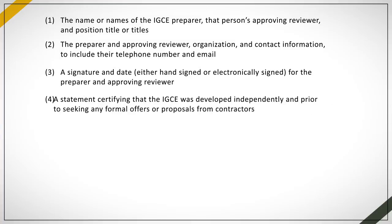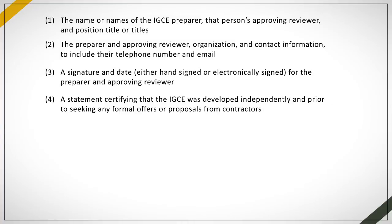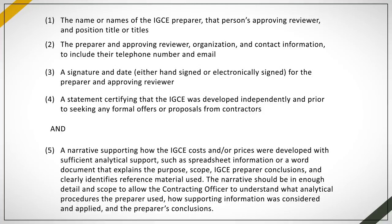You also want to look for a statement certifying that the IGCE was developed independently and prior to seeking any formal offers or proposals from contractors, and a narrative supporting how the IGCE costs and/or prices were developed with sufficient analytical support — such as spreadsheet information or a word document that explains the purpose, scope, IGCE preparer conclusions, and clearly identifies reference material used. The narrative should be in enough detail and scope to allow the contracting officer to understand what analytical procedures the preparer used, how supporting information was considered and applied, and the preparer's conclusions.